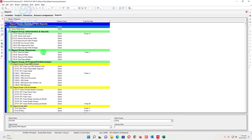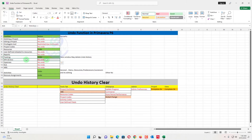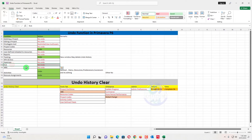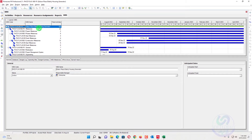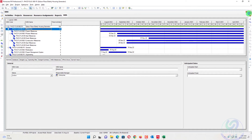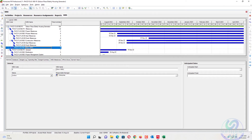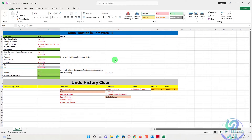At tracking, you can undo — anything you've done at tracking can be undone. However, in WBS and Docs files, there is no undo. In Expenses, no undo. In Risk, no undo. In WBS, no undo. Be aware: if you have created or added any WBS here, you cannot undo it. You just go and delete it manually — that is the only option.